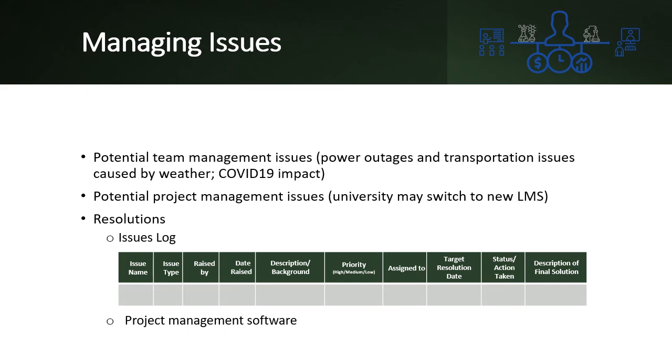Without a defined process, there is a risk of ignoring issues or not taking them seriously enough, which could prevent dealing with them successfully. An issue log allows you to do the following: have a safe and reliable method for the team to raise issues, track and assign responsibility to specific people for each issue, analyze and prioritize issues more easily, record issue resolution for future reference and project learning, and monitor overall project health and status.